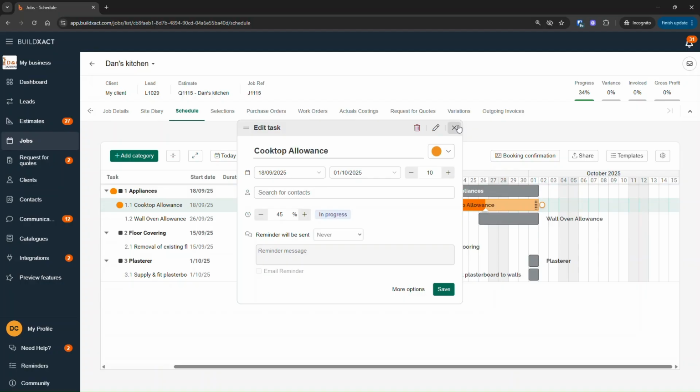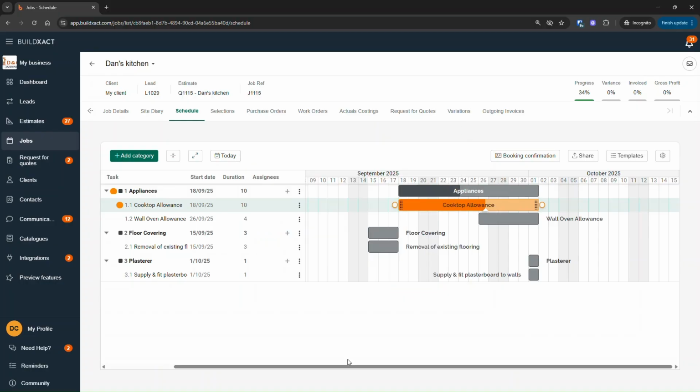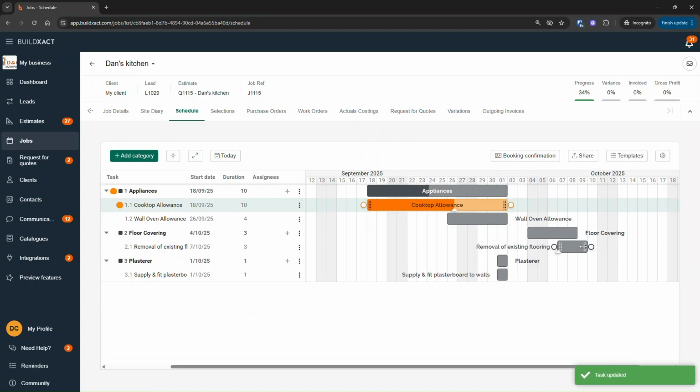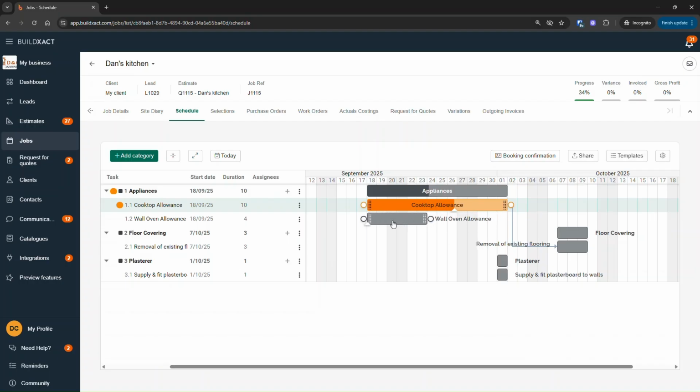and reminders. So the linking, what I'm talking about here is basically having one task depend on another task. So I can do this two ways. I can grab these dots and go end to start, literally meaning that this task is sensitive to the end date of this one. Or I can do start to start, which, if I put that there, is where the start dates are kind of correlated.